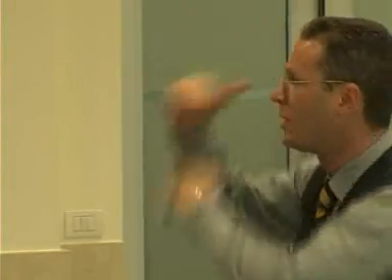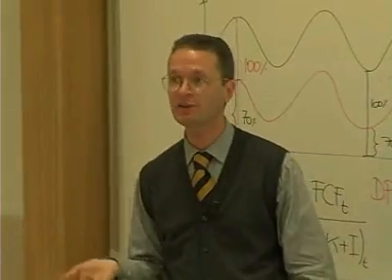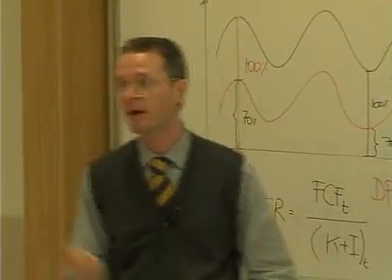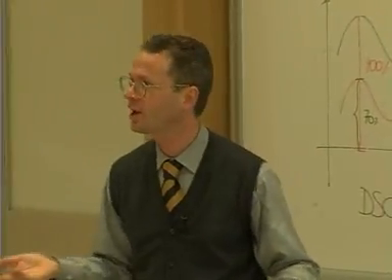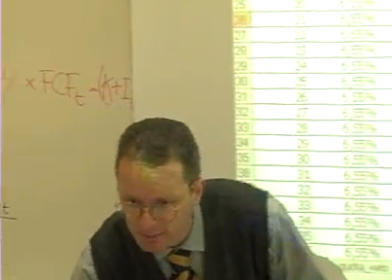Okay? But look at the value of the debt service cover ratio. If I use the dedicated percentage that is lower, will it be higher or lower than before? Higher, for sure. I want to have a higher difference between the free cash flow and the debt service. That's obvious. Okay? Let's return to the 70%, because maybe one of the standard exercises that can be required of one of you during the exam is: show me the scheduled repayment using the dedicated percentage. It is quite obvious. Let's get back to the 70%.